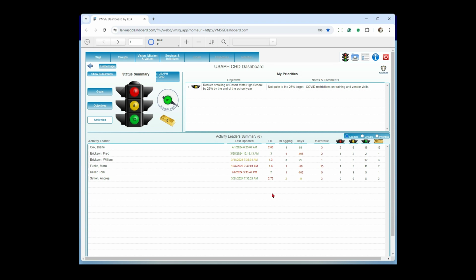And then the other thing you want to do here is make sure that you're not overloading people. You get people at a 1.5 FTE or greater, they're going to be overloaded and be looking for a new job basically at that point.